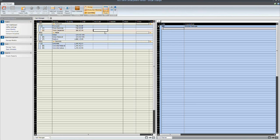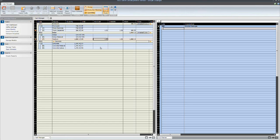So for every hour which is in the estimate, I'm going to use one hour in the schedule. So you can put an overriding error. If the scheduler isn't quite happy with what's in there, he can put a factor in to make allowance for the actual schedule perhaps.